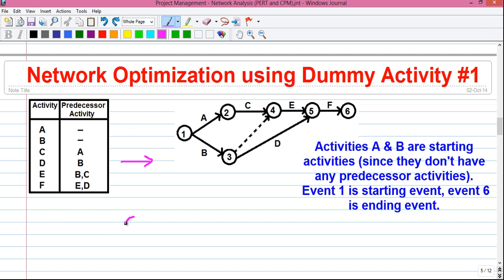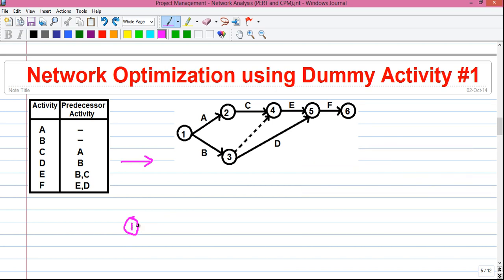So first, we will draw a circle which represents an event. Let us give it a number, let's say 1. So next, we will draw two activities, activity A and activity B. Activities are represented using arrows and the end of the activity also represented by an event. So end of activity A is represented by another event. Let us say it is event 2 and end of activity B is represented by event 3.